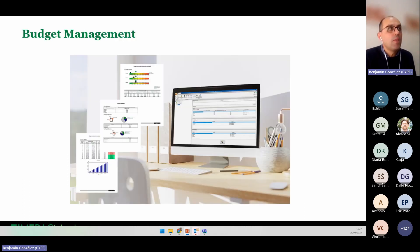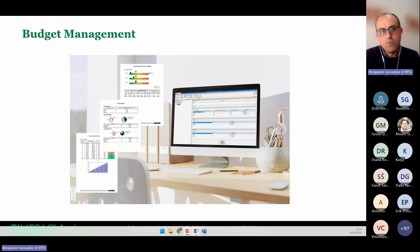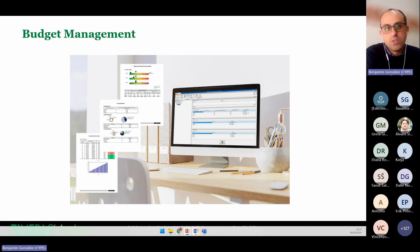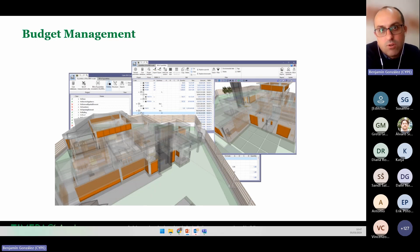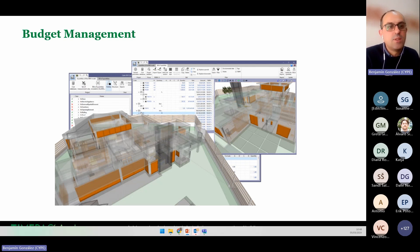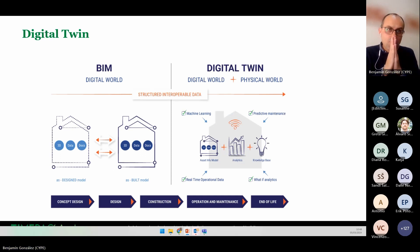If we have a 3D model with energy, acoustic, and other models connected, another major advantage is the bill of quantities. The bill of quantities is mandatory for a renovation, and with BIM we can generate better bill of quantities reports. We can connect the energy simulation with the budget of every measure and improvement, helping to take better decisions for the whole project.